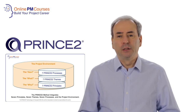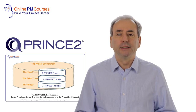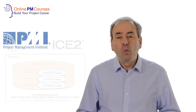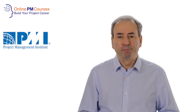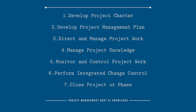Let's have a look at the different views that PMBOK and PRINCE2 take on the processes that form the project integration cluster. Within PMBOK we've got seven processes: the first is to develop the project charter; the second is develop project management plan; then direct and manage project work; manage project knowledge; monitor and control project work; perform integrated change control; and finally close the project or phase.